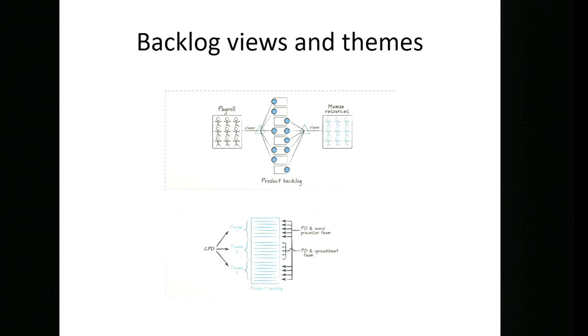And I suppose there's a couple of interesting ones there where they can both see the same item in the backlog, and presumably at that point they'd have to coordinate which team was going to work on those items, so they didn't somehow both end up implementing it twice.